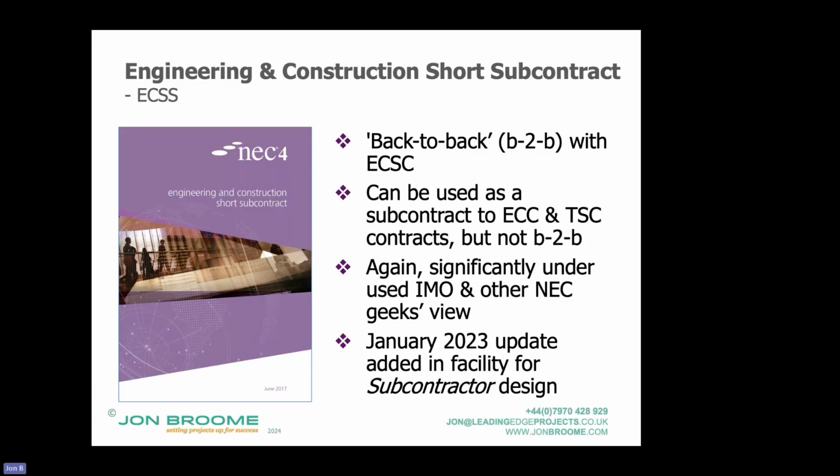And again, I think that's because lawyers look at it and go, oh, we want back to back. And some of that comes from the main contractors, the clients who want things back to back, their client lawyers. And again, the January 2023 update added in the facility for subcontractor design. You wouldn't do complex subcontractor design, but simple subcontractor design is allowed for.